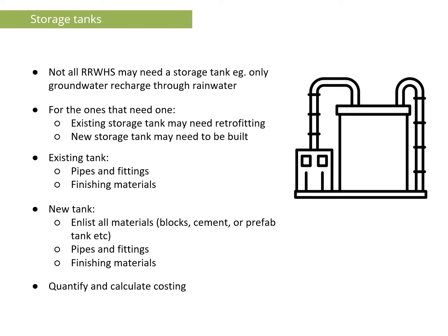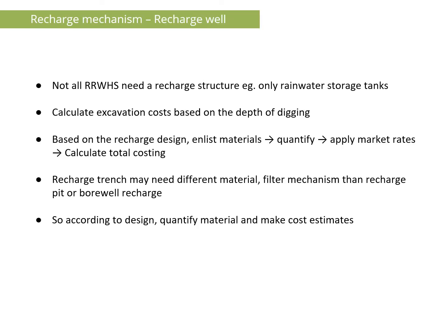In case of an existing tank, there will be the pipe fixing and finish material. And in case of a new tank, you have to enlist all materials to build the tank, then pipe fixing and finish material. At the end, you have to quantify the material and calculate the cost. For the other component like recharge well, the cost calculation is the same as the storage structure. In some cases, the installation of a recharge well may be required and in some cases may not.